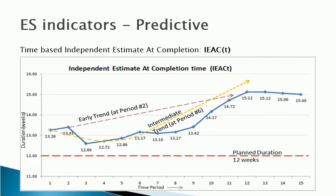One of the benefits of using ES is the ability to predict project completion time more accurately. We can calculate the time-based Independent Estimate at Completion, IEAC(T), which is a statistical estimate of total time for completing project work. In the diagram, an early trend line at the end of period 2 predicts a project duration of about 15 weeks, or a delay of about 3 weeks, while an intermediate trend curve drawn at period 6 projects a duration of about 16 weeks, or a delay of about 4 weeks compared to the planned duration of 12 weeks. The Independent Estimate for Completion Date, IECD, can be easily calculated by adding IEAC(T) to the project start date.